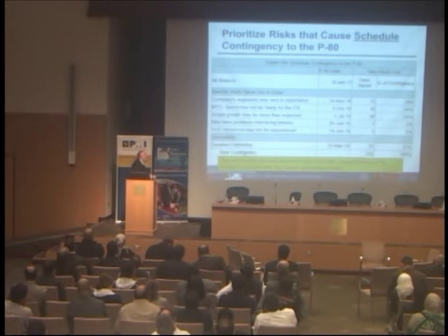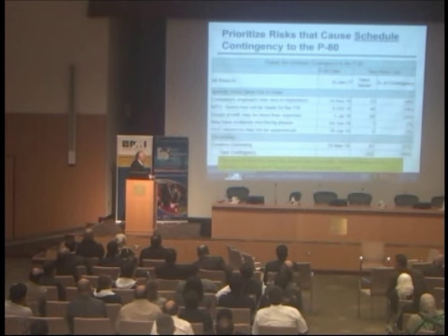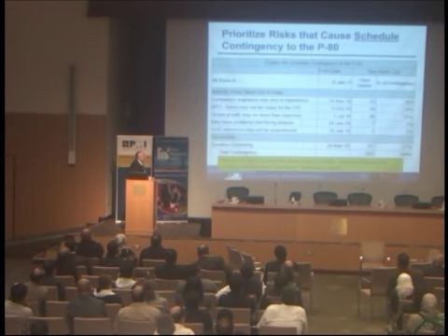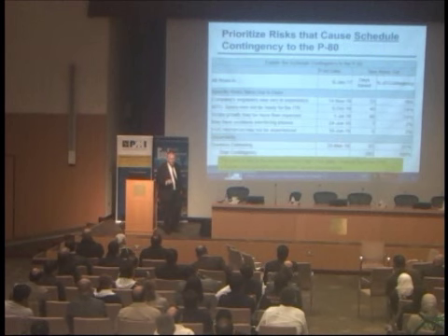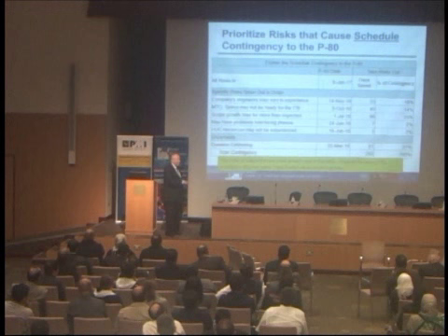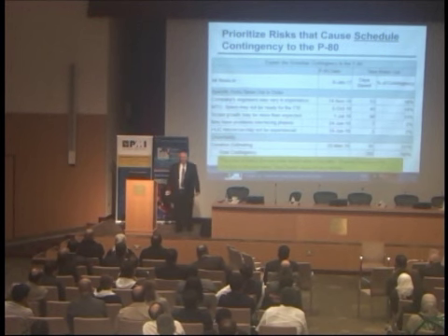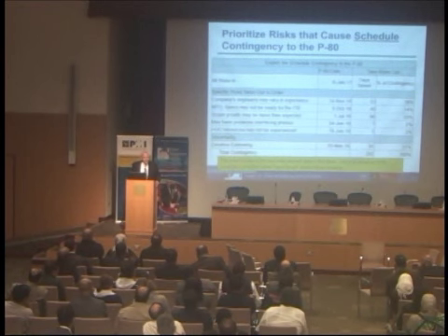Notice that the third most important risk is 96 days, and you say, Hulett, scope growth may be more important than expected. It's 96 days. Why isn't it number 2? Why isn't it number 1? Well, I promise you it wasn't number 1. I promise you it wasn't number 2, because we considered it at every stage, and it didn't give us an earlier 80th percentile date, but when we took those two out, it exposed the path that that one principally affects, and it had a big impact on that path.